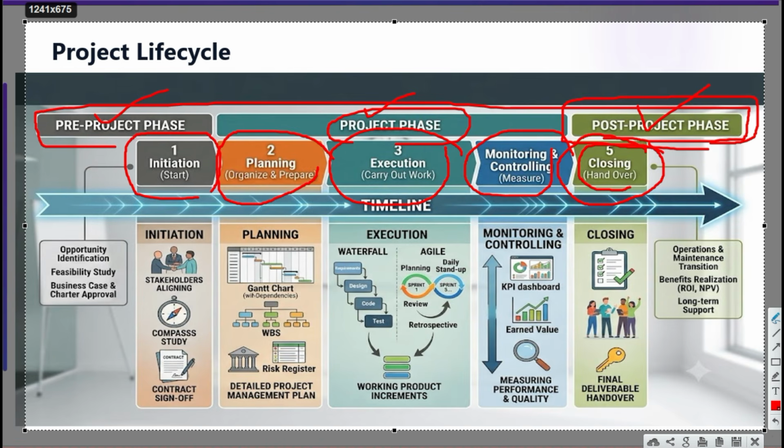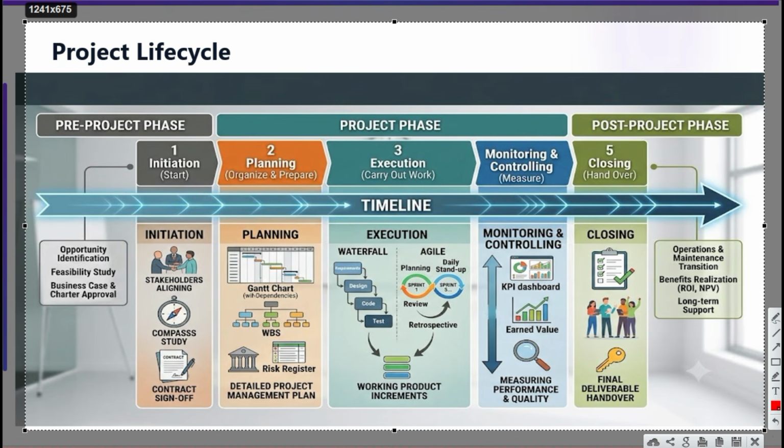In the first phase, the initiation phase, stakeholders align on different objectives. Initial scope is prepared here. They finalize the understanding and contracts are signed. So within that particular pre-project phase, there is certain other documentation that moves ahead, like scope document creation, feasibility studies, RFP, request for proposals, submitting the proposals, and then finding a vendor based on the best value the organization is going to get.